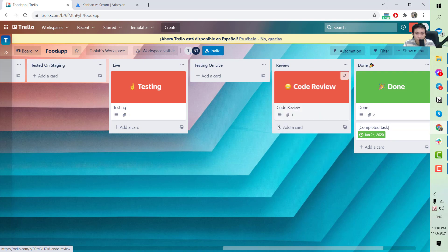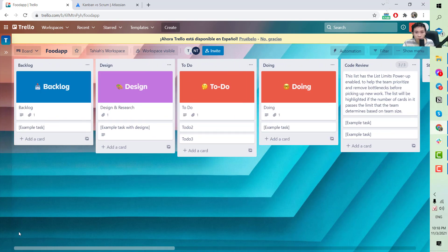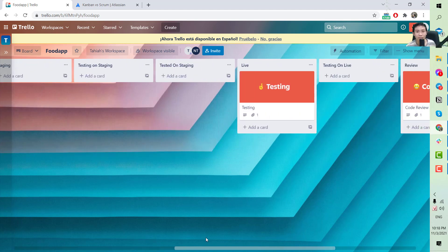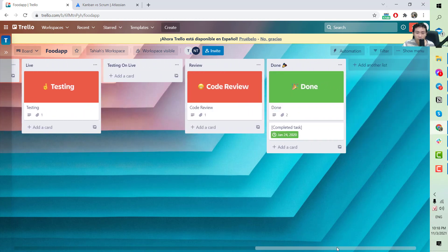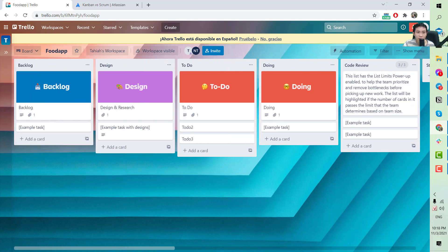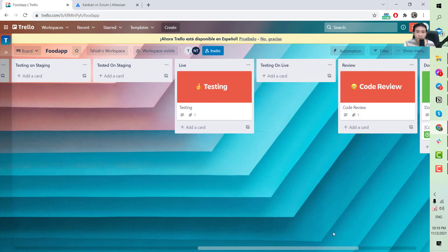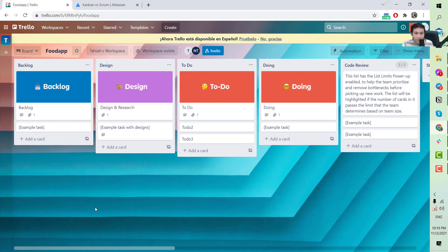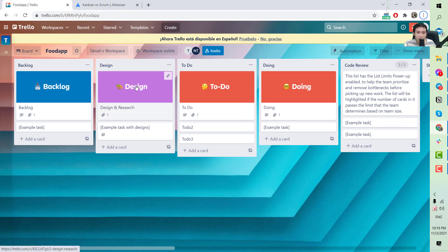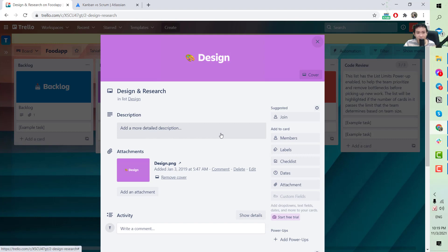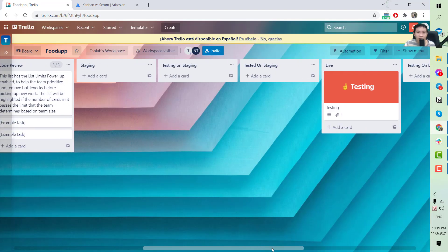This is how the Kanban board looks. It's very suitable if you are working on a project that needs continuous improvement and feedback from customers and end users. Normally I would use this over a Scrum board, since Scrum requires planning everything two to four weeks ahead. In the next video, I'll teach you how to create a ticket and put requirements in it — see you then!